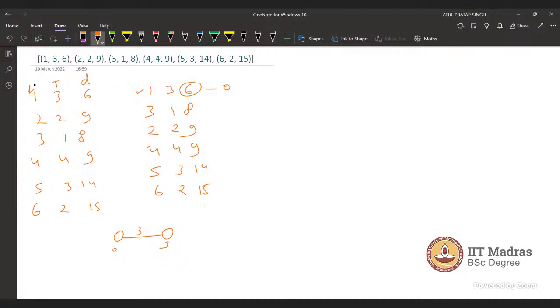So we will apply the next activity. It takes 1 time. Okay, so it will start from 3 and complete at time 4. So this is the second activity. And what is the lateness? The deadline is 8 and we are completing it at 4, so it is also 0.